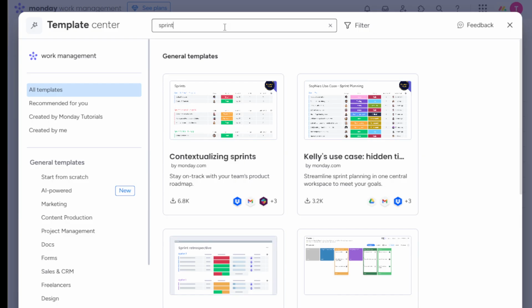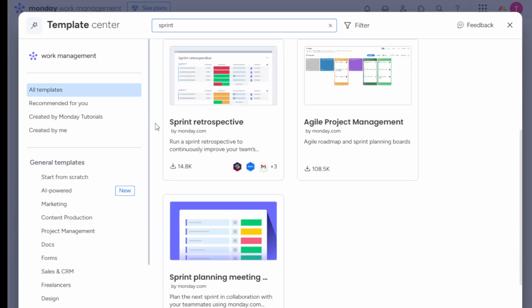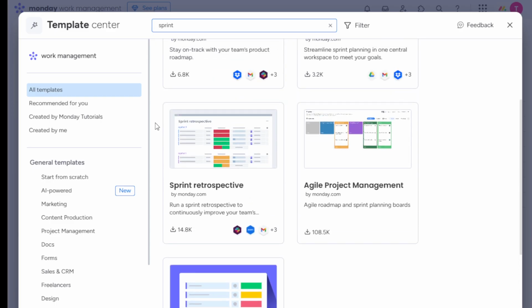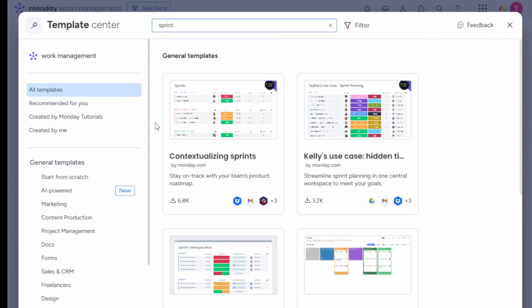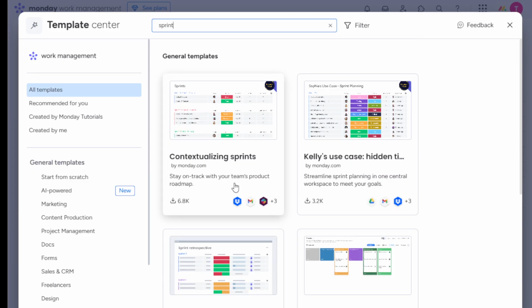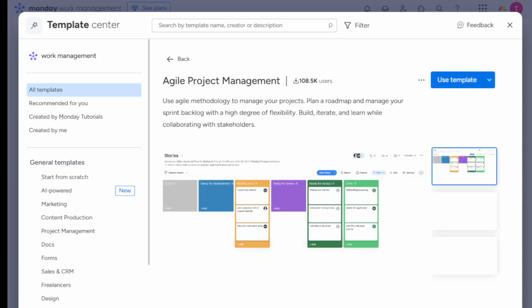Next, you'll want to add tasks from your backlog. Your backlog is essentially a list of tasks that have been identified but not yet started. You can easily visualize this as a pipeline of work that feeds into each sprint cycle. To move tasks onto your sprint board, simply drag and drop them from the backlog list. If you don't have a clear backlog, take a few moments to create one by identifying tasks using input from your team and any prior planning notes you may have. A defined and prioritized backlog helps ensure that you are focusing on the most pressing tasks, setting your team up for success.